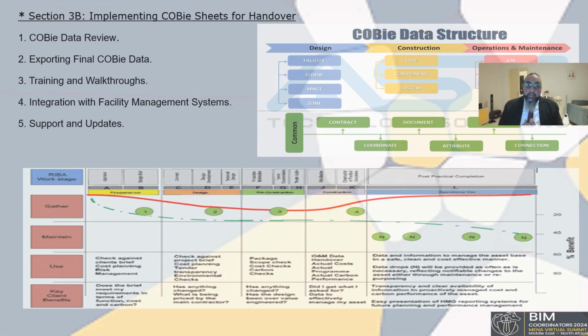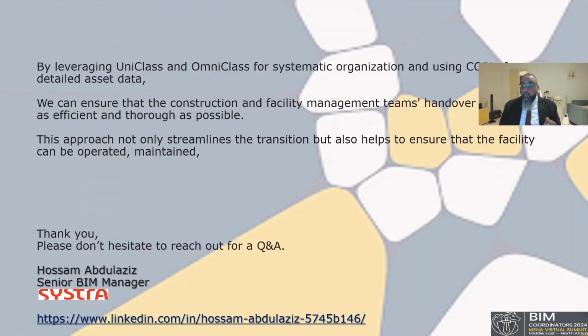Support and updates: the project team should be available to provide post-handover support to address any questions and provide clarifications on the COBie data. As the facility is used and maintained, the COBie sheet can be updated to reflect the changes and ensure it remains a valuable resource for the facility management team. This is about implementing COBie sheets in the handover.